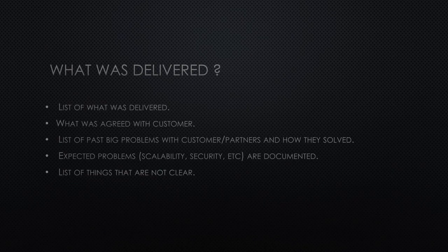So, for the project handover, make sure that you have a list of what you achieved, what was delivered to the client, and what you agreed with the customer or client. Also, if you had some issues with the client or customer, make sure that you explain them in the handover, and if you solved them, also explain how you solved them.